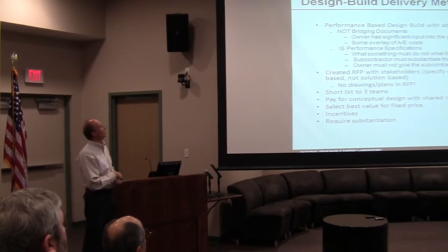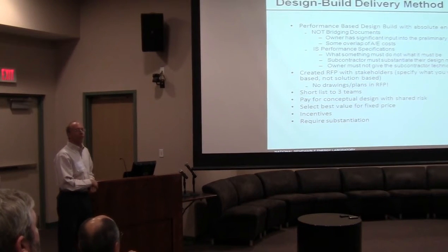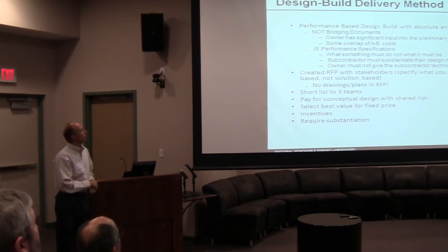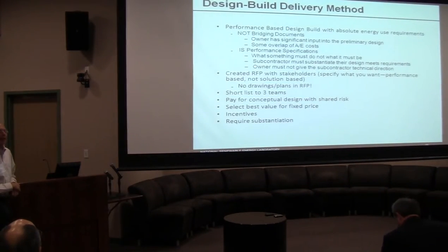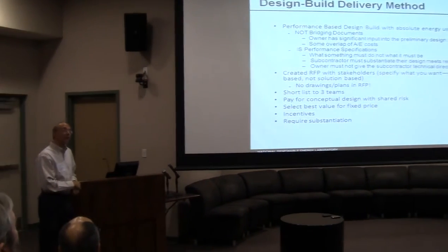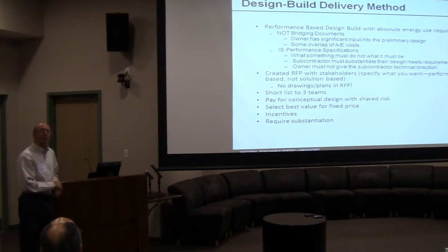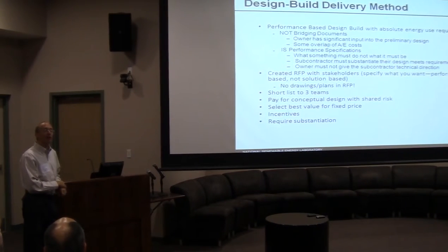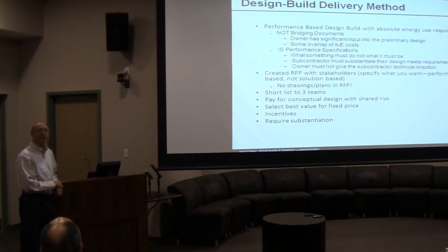So that was, it was performance-based. And so part of it was the team had to come up with substantiation criteria, not the owner. Right? So in essence, what was happening is that when we invited people to play, they developed their own rules, as long as they were within the framework in our RFP. They signed up for this. We didn't tell them to do it. They had ownership of what they were signing up for. That's a big deal in terms of getting them on board and having them all go in the same direction.